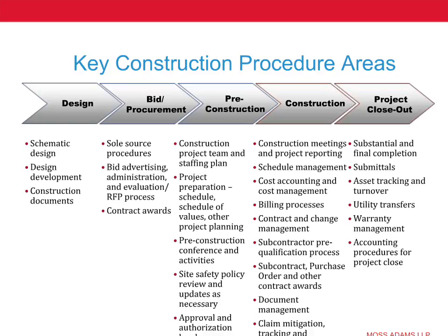In the construction phase, there are a number of items listed: construction meetings, schedule management, cost accounting, billing, contract and change management, subcontractor pre-qualification, and right there is another DBE compliance requirement. And then we get into project closeout, substantial and final completion, submittals, asset tracking.